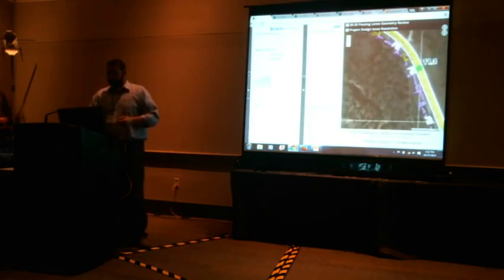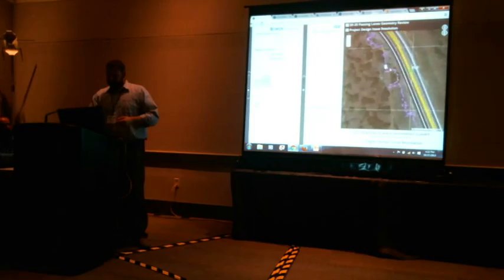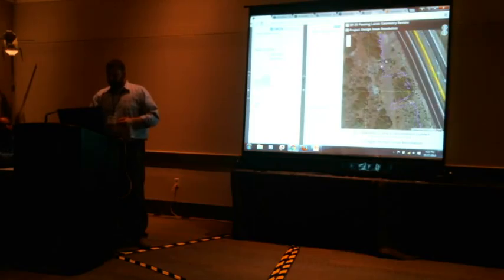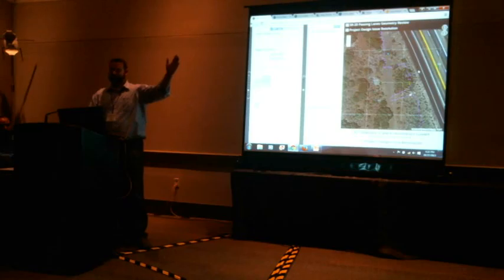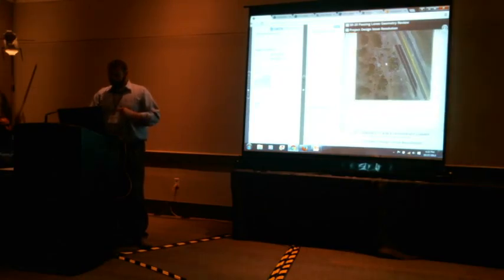One big one that I like to point out is there is a cattle guard right here. It's an older cattle guard. We've got to preserve it. It's just got to stay in there. But at our current, and this is getting way beyond me in design stuff, I don't design, but this fill line is going to cover that up. So now they've got to resolve this issue. What do we do?